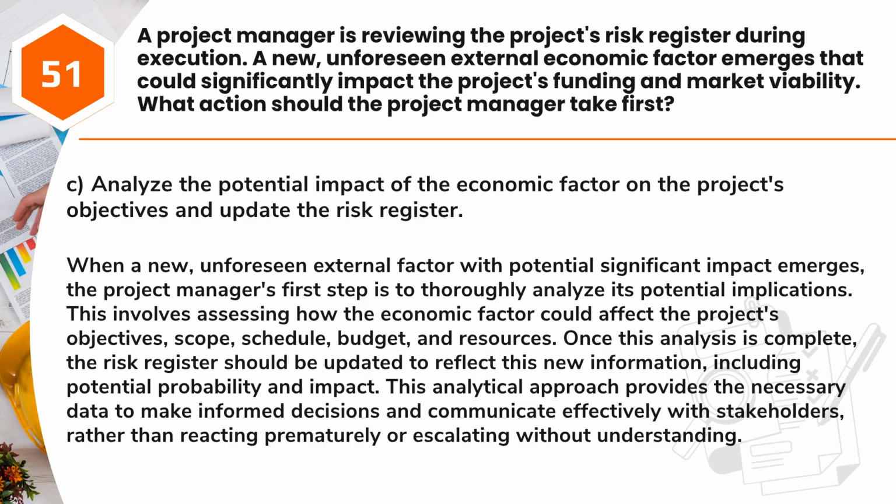Once this analysis is complete, the risk register should be updated to reflect this new information, including potential probability and impact. This analytical approach provides the necessary data to make informed decisions and communicate effectively with stakeholders, rather than reacting prematurely or escalating without understanding.